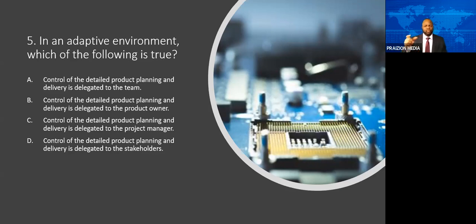How do you delegate what is in the sprint backlog to a developer? You don't. They pick what they are going to do from the backlog. It's different from the traditional approach where we say, all right, you, Allison, you're going to do this. Brittany, you're going to do this. Yasser, you're going to do this. Mohammed, you sort everything else out in the integration. Fail you.